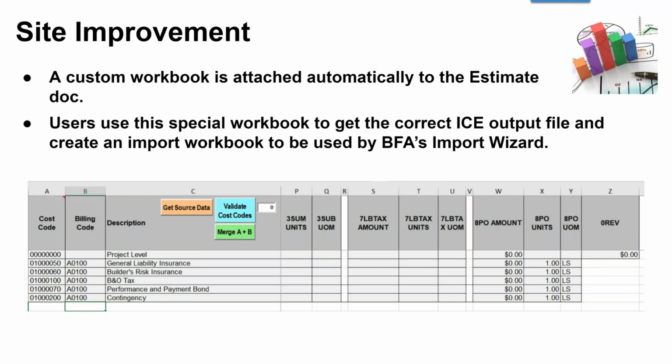They just push the button and it reviews all of the cost codes they have in the list here against the validated list, and if one of the items doesn't validate, it actually pops up with, you should be using this number, or you could be using any one of these numbers. Please select, and then they're allowed to select it, and the system will go ahead and make the changes. So that's what we did at the front end as far as improvements were concerned.